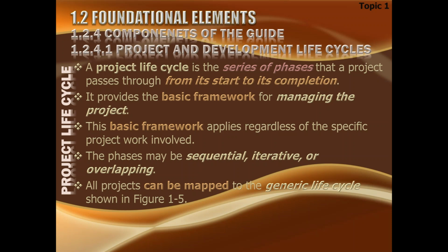So whatever work you have done in the finishing phase will all go waste. You may have to redo it after the corrections have been made in the previous phase. Therefore, until and unless a phase is closed, you should not be starting work on phase 2.